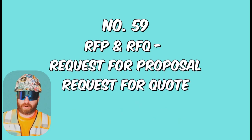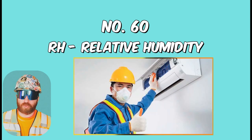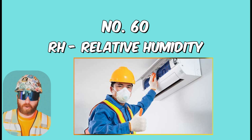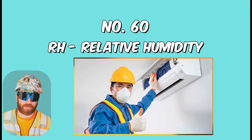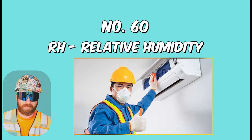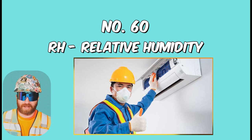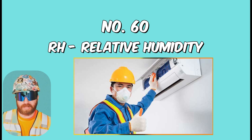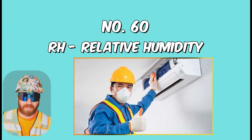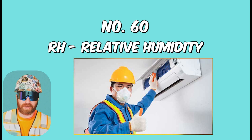RFP and RFQ — Request for Proposal and Request for Quote — are just acronyms when you're asking for pricing on something. RH, Relative Humidity — simple but important. When you start finishes on a project such as drywall or installing casework, the building needs to be acclimated as do these products. If they're not, you can get cracks in the wall or warping in your building materials. This is why buildings are temporarily heated in the cold and cooled in the heat to maintain schedules throughout different seasons.